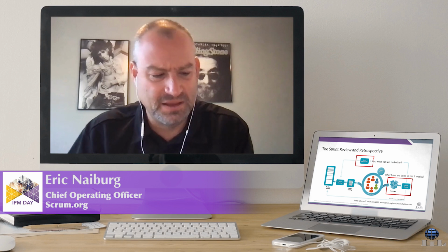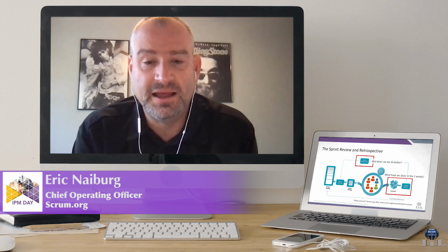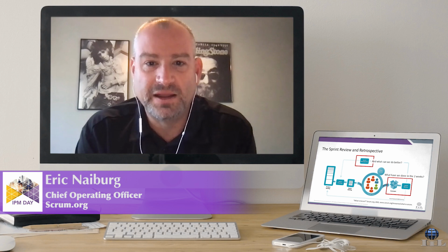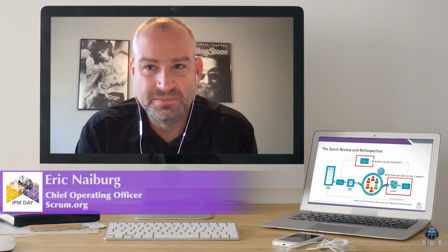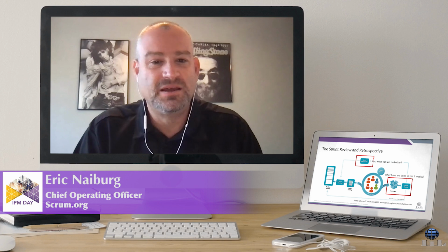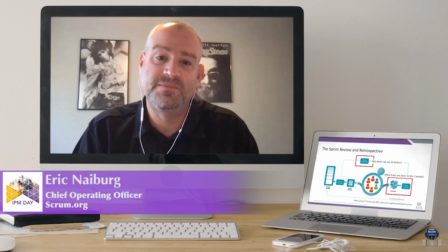I had a conversation one day with Ken Schwaber about this and why would we add those things to the product backlog or even the sprint backlog? And he said, if we don't do that, we'll always focus on the product and not the people. If we add them to the product backlog, now they get visibility to everybody. We actually can prioritize not just improving the product, but we can prioritize us. We can prioritize the team and how we're working as a team.